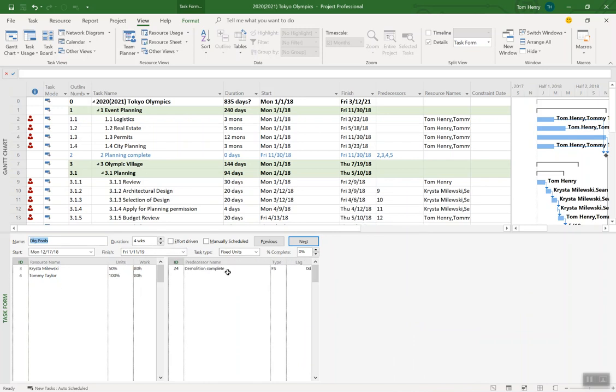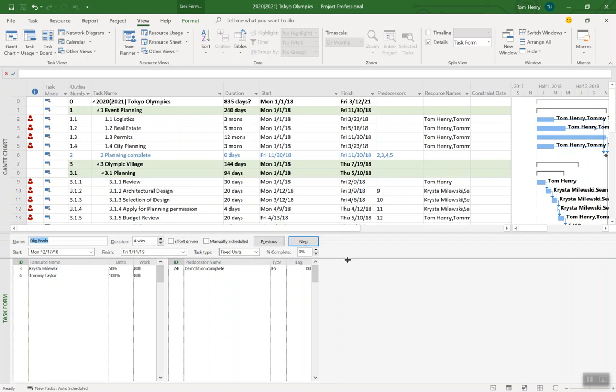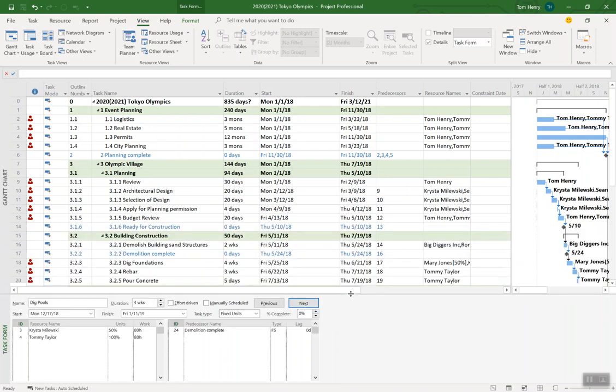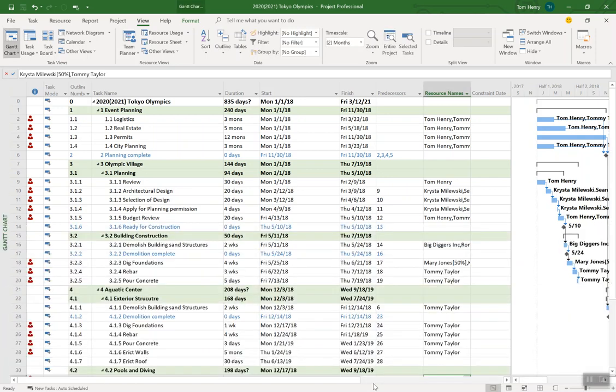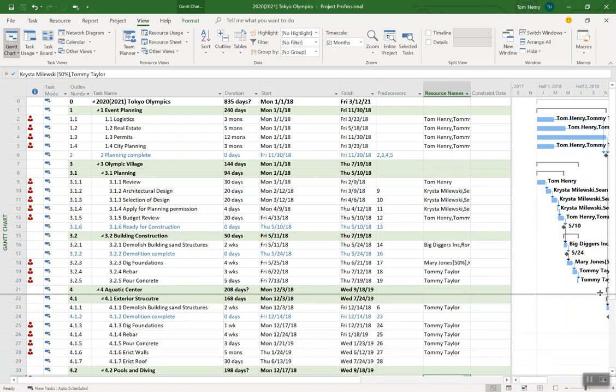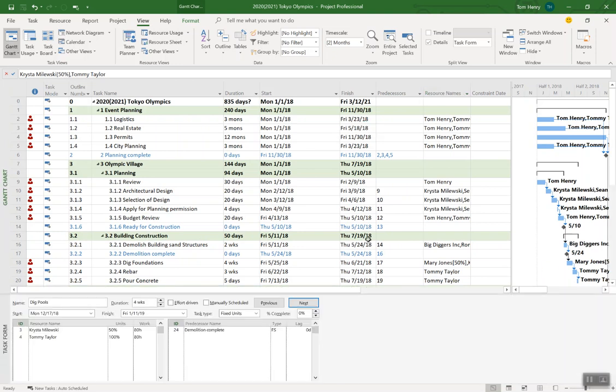You can see the predecessors to that task here. You can get full access to the assignment planning variables. The duration. The units. And how many hours of work. When that task is effort driven. Essentially it locks the work for that task. And you can adjust the task type. That's a whole nother topic there. But that's another way. Once you finish that just drag it down. If you want to bring it back. Drag it up. Like so. And you can also access that from the view ribbon.